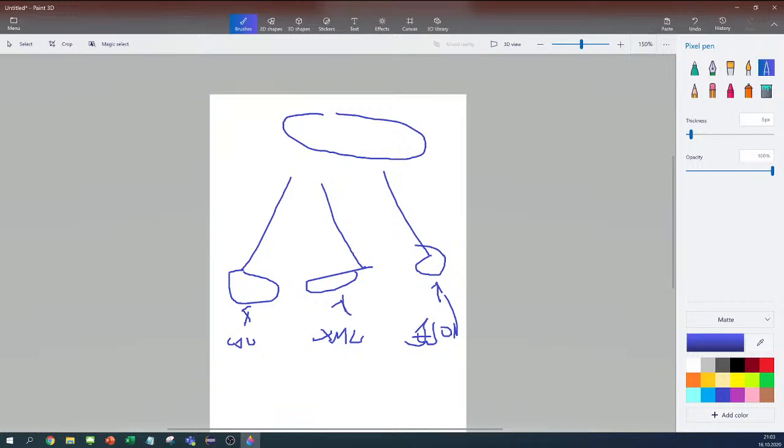In real life, if there are lots of tickets, they are not usually described in great detail. If there are a few tickets with huge development in each, then they may be described in detail. But in your case, they should not be very detailed.